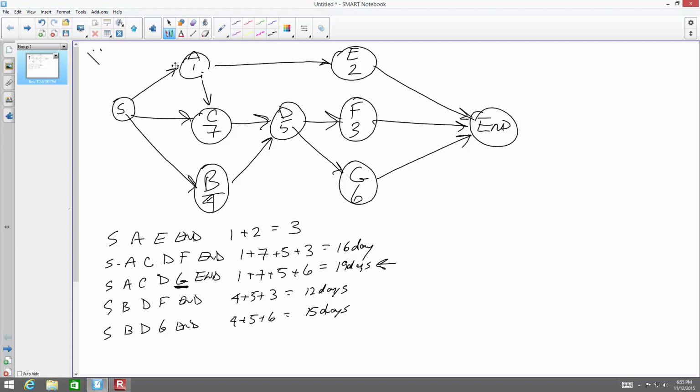And it does not require a purchase order. A purchase order is a purchasing concept and helps keep track of what's purchased. If I go and purchase a harness, I put a PO against it, so when the bill comes in, my company can look at it and see, oh, this has PO number 1023. 1023 was a harness that Jeff bought. And so that went back against a certain project, so it's an accounting term dealing with how you manage your money with the purchase orders.